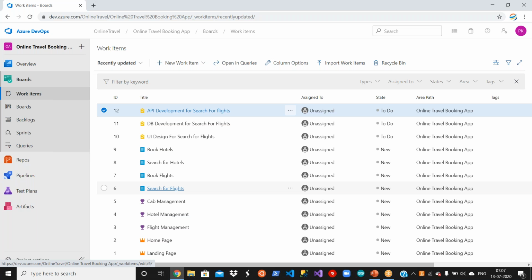Before that we need the teams. We already created the teams, and we need the sprints to be defined, meaning dates. Sprints 1, 2, 3, 4, 5, 6 are already there, because 6 sprints are created by default when you create a project. If you need more, you can go and create them, which we have already done. We also set the dates for the sprints. Now we can assign these requirements to different people as part of your planning, and for that, you need the team members.